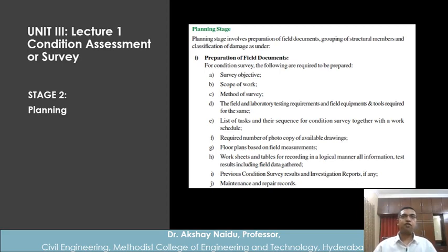Scope means, is it for the full building? Is it only for the damaged portion of the structure? Are we talking only about the ground floor lobby, or are we talking for every floor? Depends on what is the nature of the damage. So what is the scope of the work? That has to be identified.